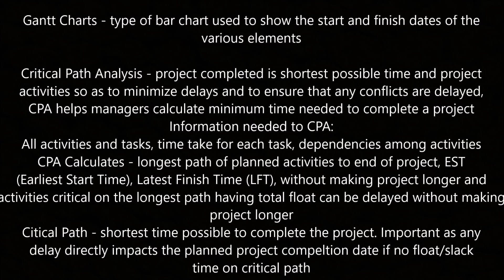Gantt charts are a type of bar chart used to show the start and finish dates of various elements. Critical path analysis is used to complete the project in the shortest time, minimising delays and ensuring conflicts are addressed. The CPA helps managers calculate the minimum time needed to complete a project. Information needed for CPA includes all activities and tasks, time to take for each task, and dependencies among activities. The CPA calculates the longest path of planned activities to end the project, the EST (earliest start time), the latest finish time (LFT), and identifies activities on the critical path. Critical path is the shortest time possible to complete the project, and any delay directly impacts the planned completion date if there is no float or slack time.